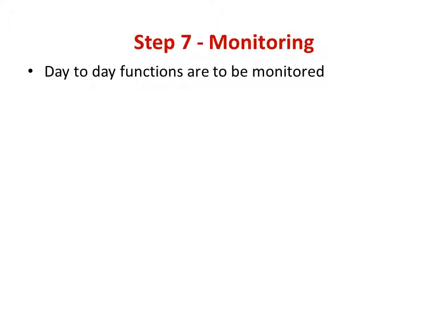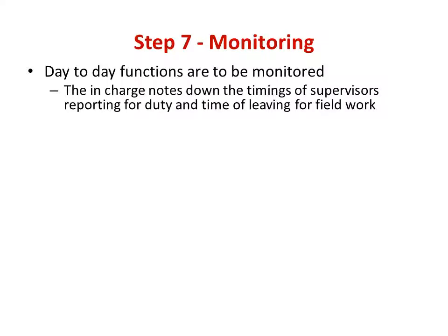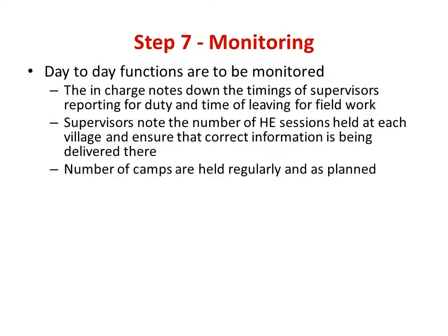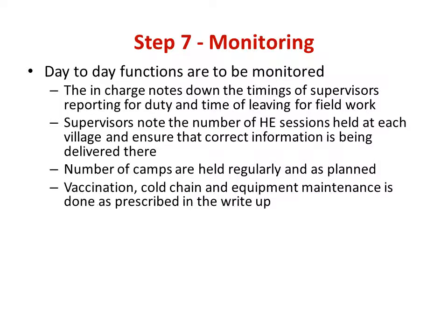That is, day-to-day functions have to be monitored so that the program functions and moves as is given in the write-up. For example, in this case, the in-charge notes down the timings of supervisors reporting for duty and their timing for leaving for field work, noting down the number of health education sessions held at each village and ensuring that the correct information is being delivered at these. Number of camps that are held regularly and as planned can be noted down.